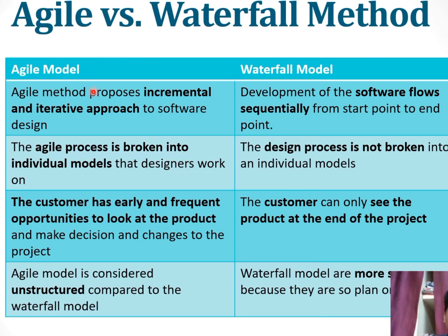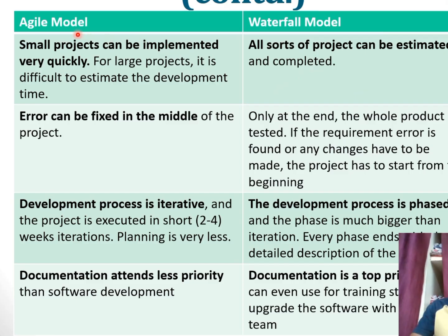Comparing agile with the waterfall method: agile is an iterative-based approach while waterfall is a sequential-based approach. In agile, the project can be broken into small modules that the designer can work on; in waterfall, the project cannot be broken and must proceed phase by phase. In agile, the customer has the opportunity to get early outputs, but in waterfall, output is only available at the end of the project. Agile is considered unstructured compared to the waterfall model.